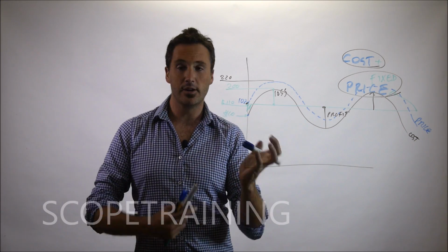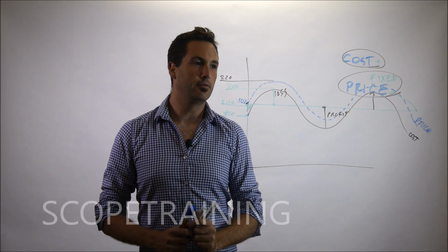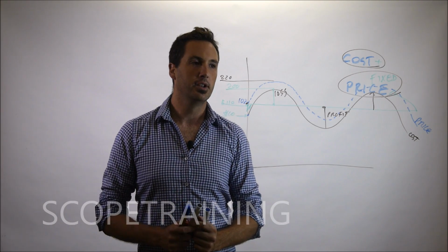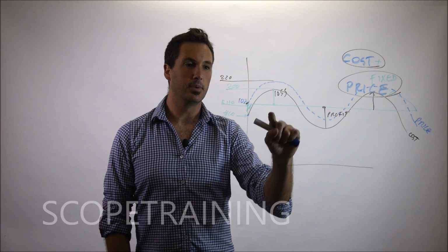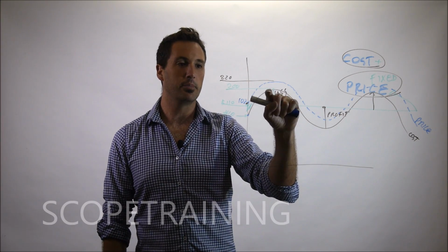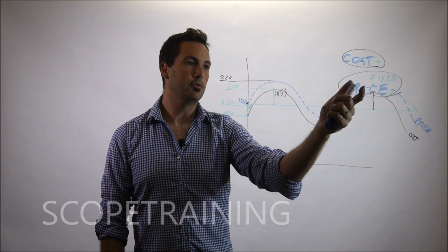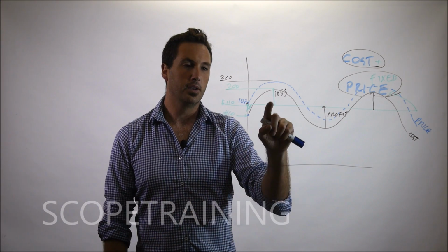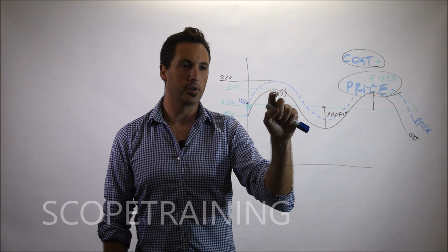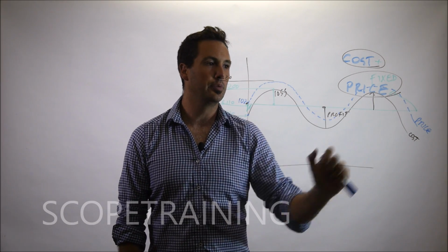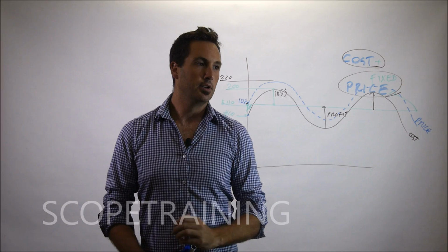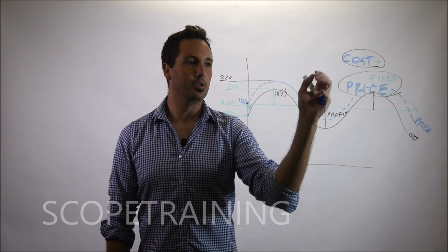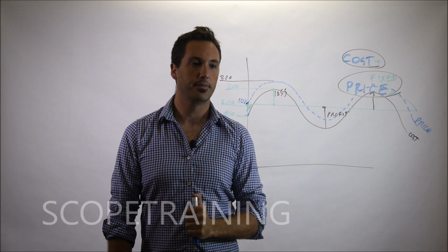Okay. Advantages and disadvantages to both. The fundamental thing is it's a transfer of risk. So cost plus contract, usually the buyer bears the risk because if the cost goes up, the price also goes up. In a fixed price contract, usually the contractor bears a degree of the risk because if the cost of doing the service goes up, generally the price will remain static. Cool, hopefully that's explained very quickly the differences between cost and price.